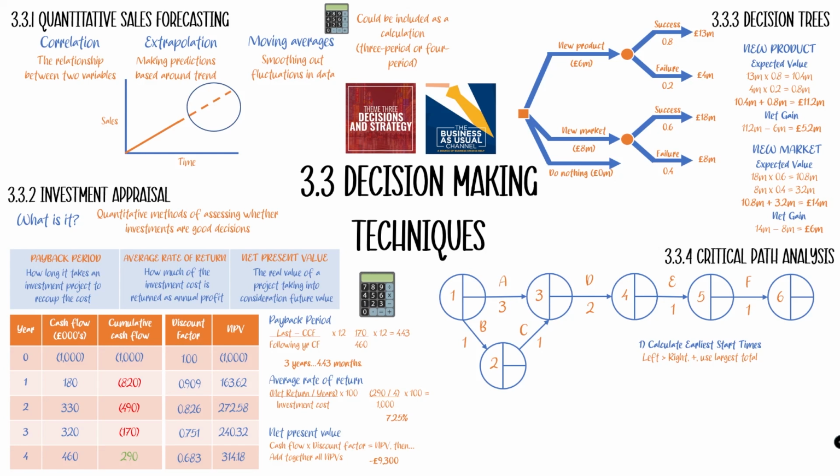And we're going to calculate this going left to right. We're going to add as we go. And if we've got more than one option, and we'll see this, use the largest total. I'll explain why when we get to one. So we're going to start with 0. So I'm going to do these in green just so you can see them easier.